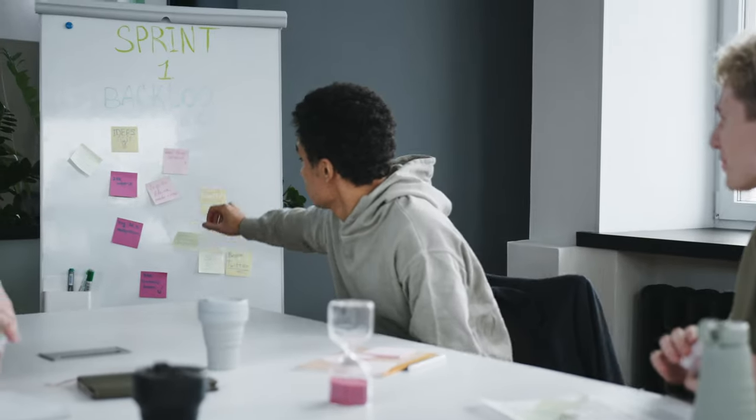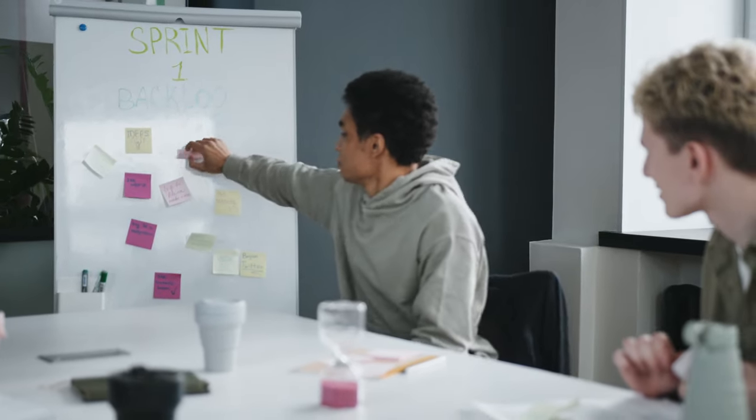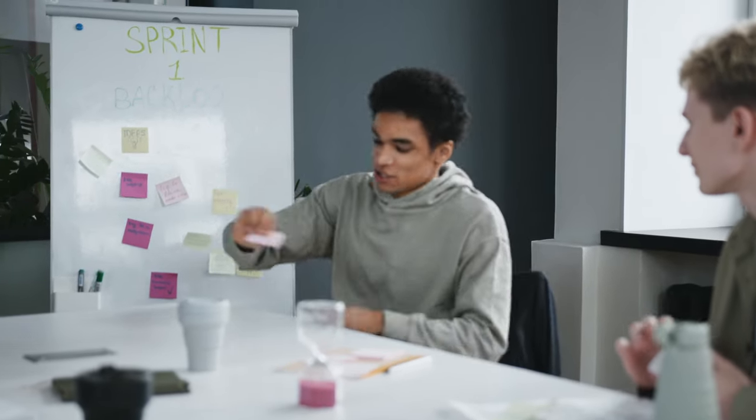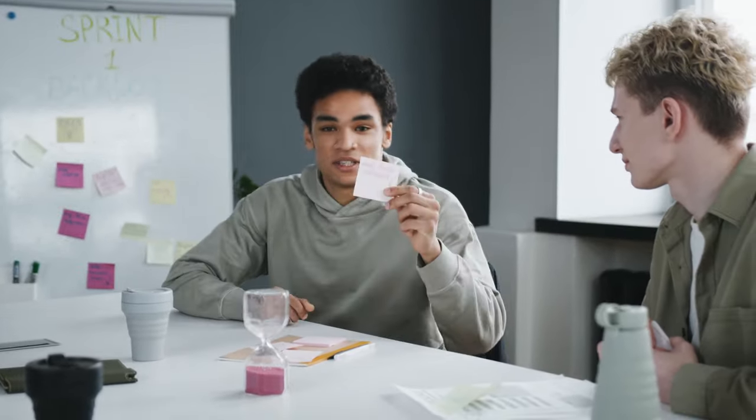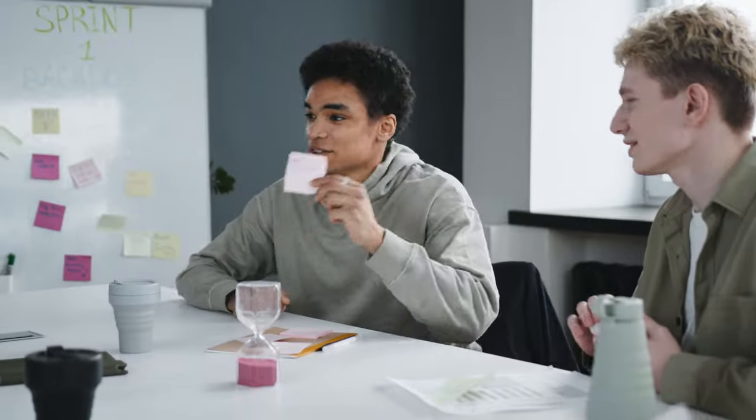Usually the teams and projects I've been on try to break down eight pointers and 13 pointers into smaller stories, because having an eight pointer within a sprint can be really challenging and overwhelming for developers.